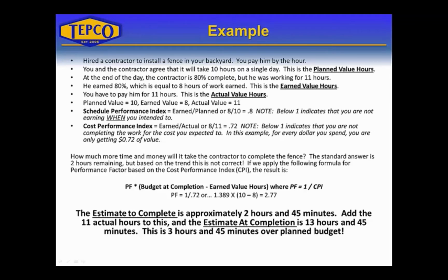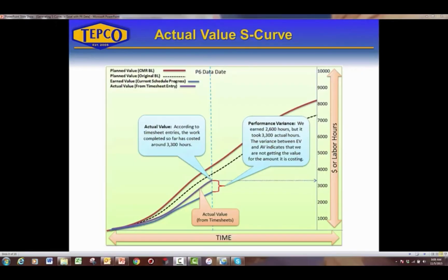Add the 11 actual hours to this, and the estimate at completion is 13 hours and 45 minutes. That's 3 hours and 45 minutes over the planned budget. Here's the same graph we've been looking at, but now I've added the actual value.